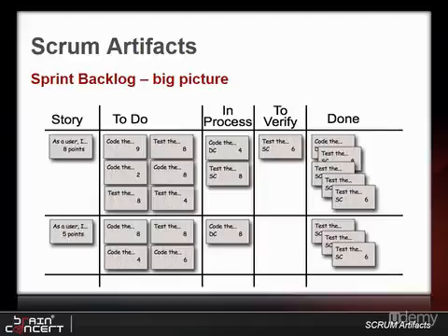At the task level, you estimate the number of hours each task will take to complete. Since your sprint has a specific length and there's a set number of available working hours, you can use the time each task takes to determine whether the task will fit into your sprint. Each task should take 1 day or less for the development team to complete.